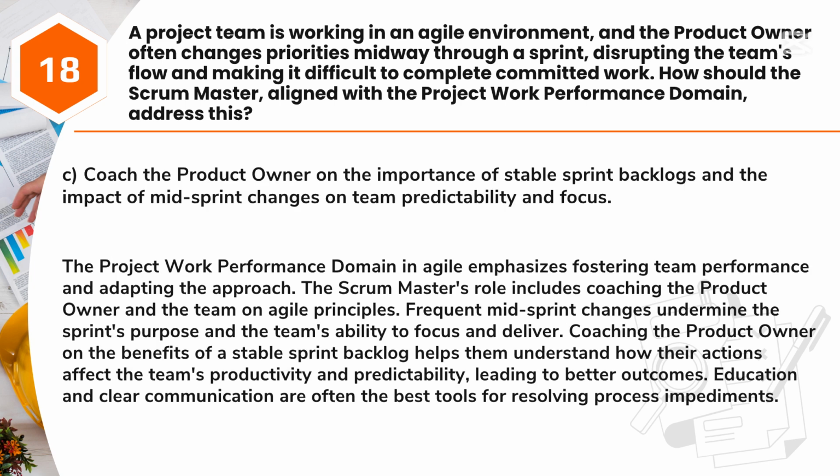Answer: C. Coach the product owner on the importance of stable sprint backlogs and the impact of mid-sprint changes on team predictability and focus. The project work performance domain in Agile emphasizes fostering team performance and adapting the approach. The Scrum Master's role includes coaching the product owner and the team on Agile principles. Frequent mid-sprint changes undermine the sprint's purpose and the team's ability to focus and deliver. Coaching the product owner on the benefits of a stable sprint backlog helps them understand how their actions affect the team's productivity and predictability, leading to better outcomes. Education and clear communication are often the best tools for resolving process impediments.